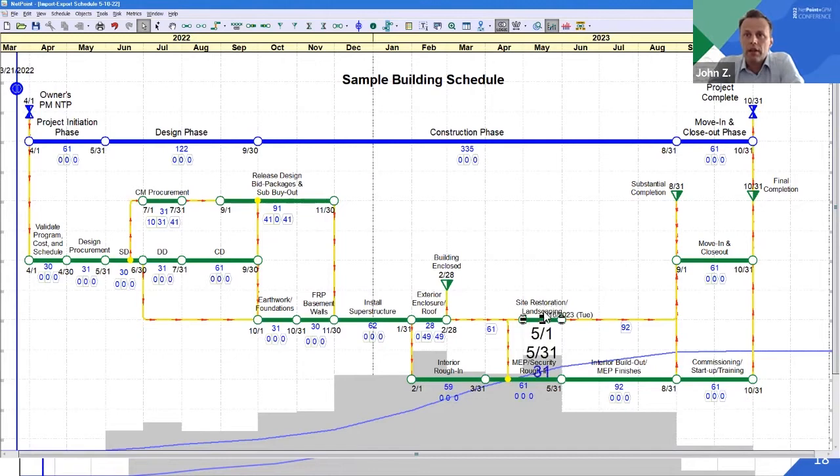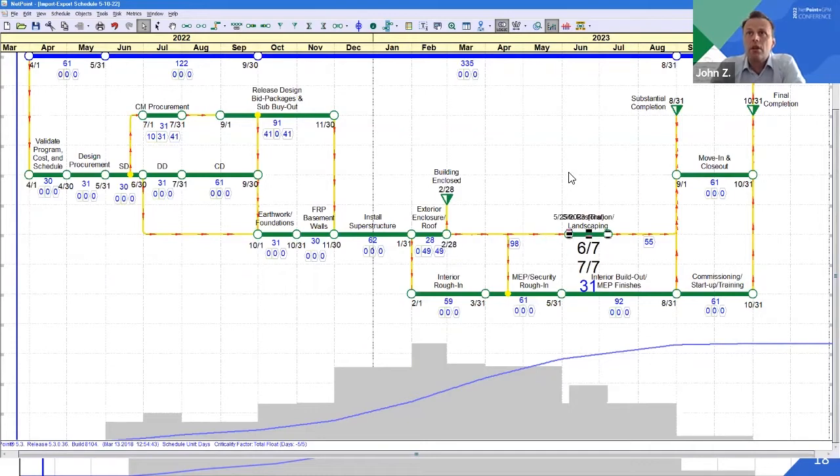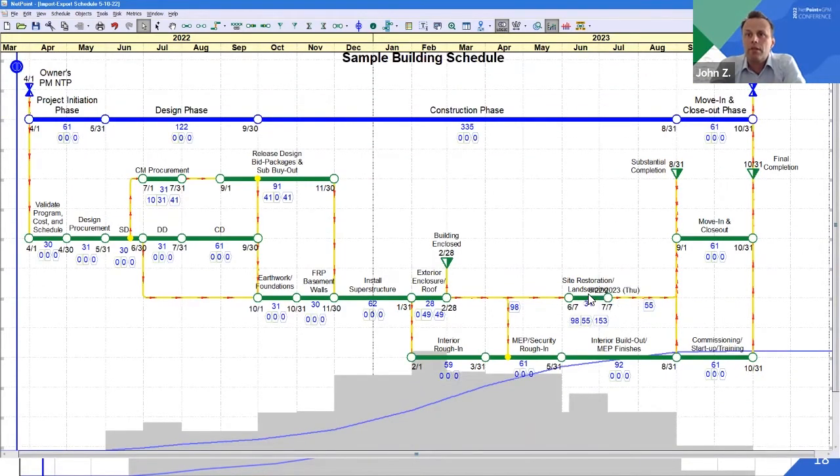Also, you can see if I move this activity, I guess a couple things. You can see the resource profile changing down below, kind of dynamically. So if you're doing what if scenarios, you can see how resources are changing. And you can also see these are the link gaps. So this is 85, this is 68. And so right now I have a drift of 85, a float of 68, a total float of 153. The total float is not going to change when I make these movements. But I'll put it back to where it was. So when we do our export, you can kind of see how it works out.